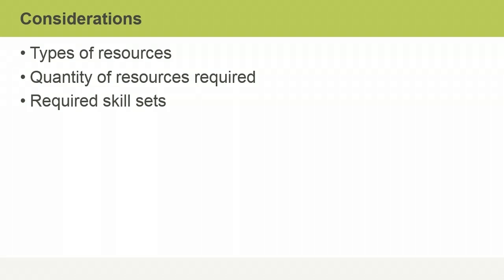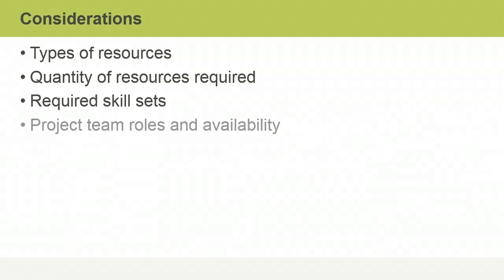Finally, the project manager needs to determine who will be filling the roles on the project team and if these people will be available when needed. Vacation times, leave schedules, other work obligations, and other projects are taken into consideration. This is critical for scheduling.